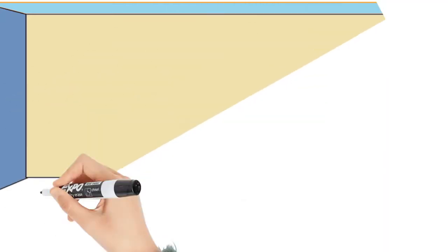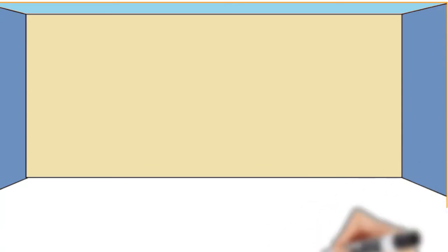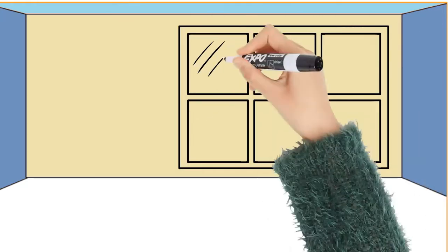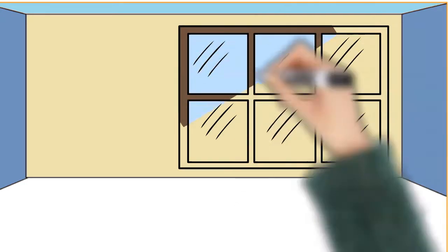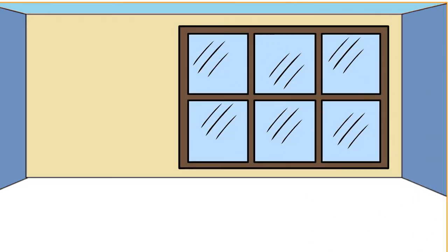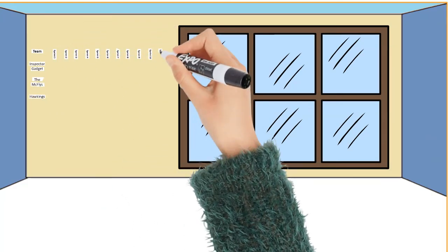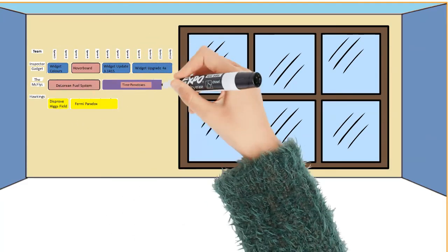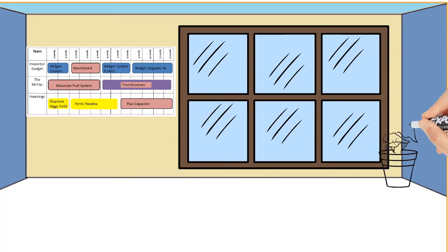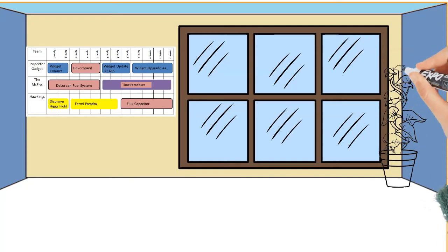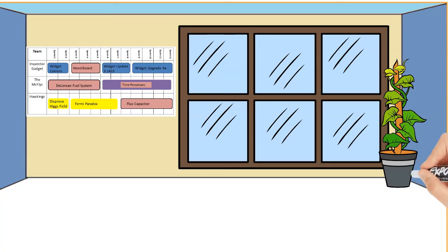As an iteration of 3 months notionally at least covers 13 weeks, it is useful to use the first week as a Sprint Zero. In this week, the squad can prepare for upcoming work, including breaking the first few epics down into features and stories, preparing the squad's product backlog, and completing planning for Sprint 1. There may also be a need to perform admin tasks like obtaining the required system access, software tools, and for the developers, access to the current software build where changes and enhancements are being made to the core systems.